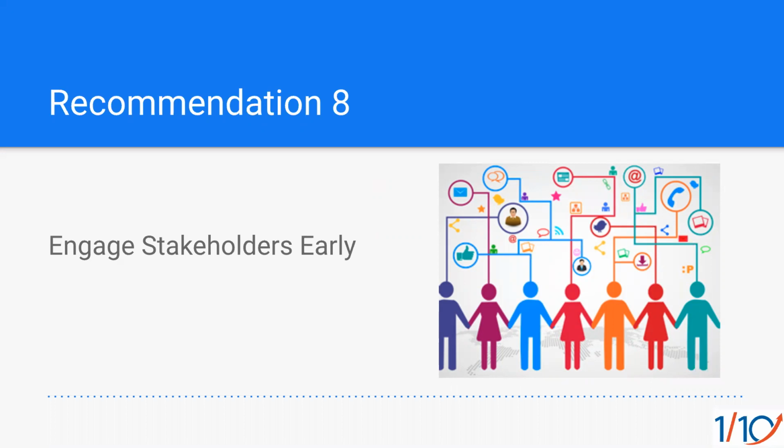So my recommendation is to engage them early. That doesn't necessarily mean they need to be part of the core project team. They could be. That's always a good approach. But if not, then it's always good to have stakeholders engaged very early on, even as early as seeing the sales demos, seeing those out-of-the-box demos, maybe giving them access to a sandbox system right at the get-go.